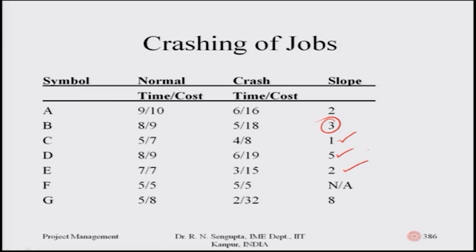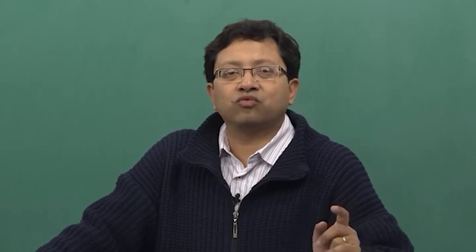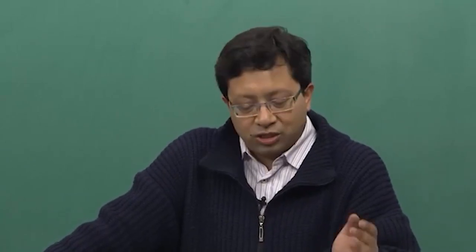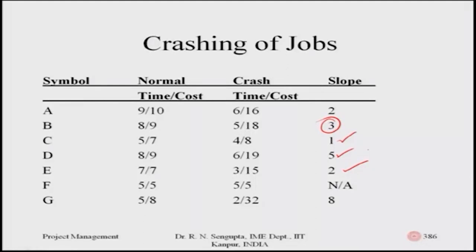For activity F, note carefully: you cannot reduce the number of days. Consider, for example, that you want a CNC machine supplied by a vendor at a fixed cost of five units. The vendor cannot extend or shorten the usage because his other clients are also in line. So you, as one of the clients, cannot have that request entertained — hence there is no concept of slope for F. For activity G, thirty-two minus eight divided by five minus two gives a slope of eight.